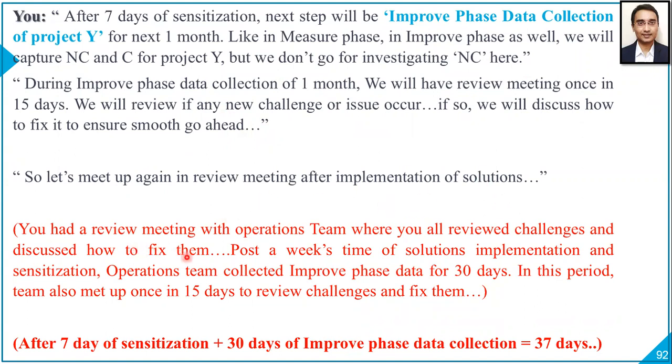You had a review meeting with the operations team where you all reviewed challenges and discussed how to fix them. Post a week's time of solution implementation and sensitization, the operations team collected improve phase data for 30 days. In this period, the team also met up once in 15 days to review challenges and fix them. So after 7 days of sensitization plus 30 days of improve phase data collection, that is a total of 37 days. After 37 days, let's go to the next slide.